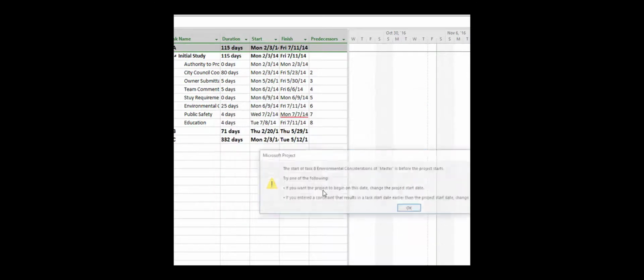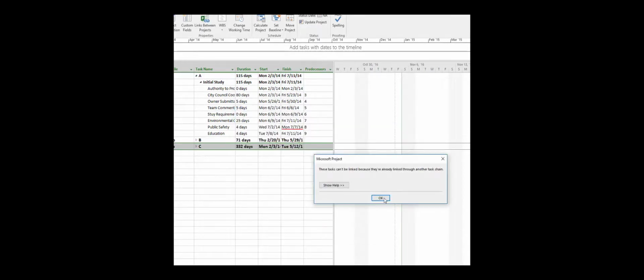What I've done here is unselect Link to Project File. We click OK. It gives me a warning. And you'll notice now that the icon disappears. It indicates that we are no longer linked to the file. This information becomes static. I'm going to do the same thing for one of the other files. Let's just do this one. I double click. I'm going to collapse that to show you something. I'm going to double click here, select the Advanced tab, deselect Link to Project, OK. And now when I open it, it's still static, but the files are still present.